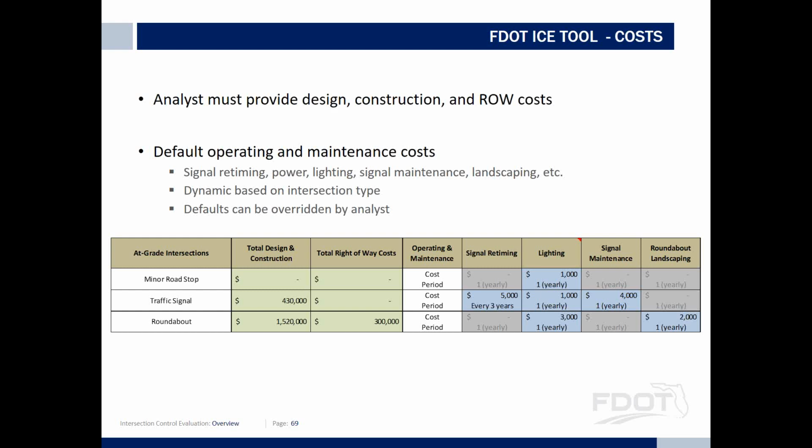So the practitioner would use the property appraiser's website, cite specific cost, or I would say worth of value of the land. There's a conversion factor that right-of-way uses as a preliminary estimate for acquiring the right-of-way. That will be utilized to provide the right-of-way cost if there's anything that needs to be acquired for the new alternative intersection.